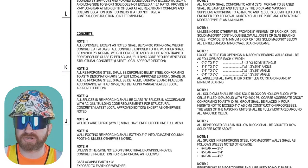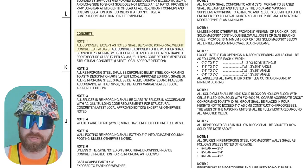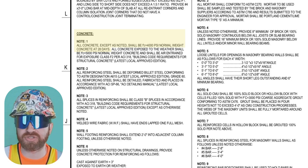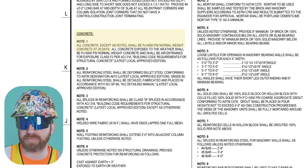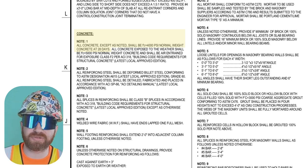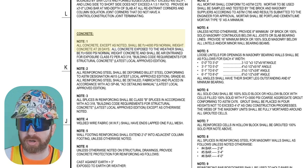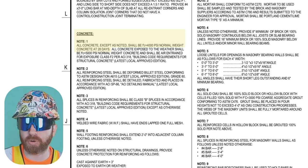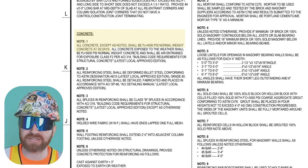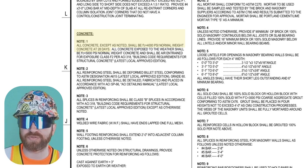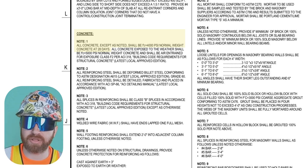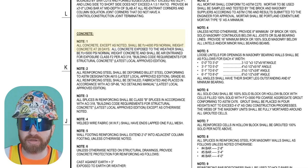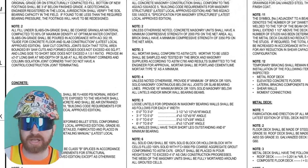Under the concrete section, note one states all concrete is expected to be 4,000 PSI at 28 days. While the concrete is being poured out of the truck, a testing company takes samples in certain increments based on the specifications — either per batch or per certain cubic yards poured. They hold the samples in a controlled state, and at 28 days run a test to ensure what was poured is meeting design. Tests can also be taken at 3, 7, or 21 days, but most specs require 28-day full strength testing. There may also be language prohibiting you from building beyond that point until testing passes, which influences your project schedule.